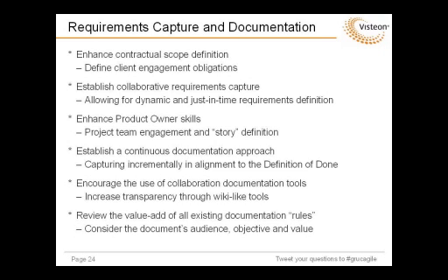Yeah, I mean, obviously, as I mentioned earlier, we're a very conservative, very traditional type of product development organisation. We like to go to our customer, negotiate a set of requirements for a component up front, and then we try and deliver that and manage change incrementally. Now, we struggle with that because the customer obviously doesn't know a lot of the time exactly what they want. There's a lot of change. There's a lot of unknowns at the front. We try to document that and have these great big documents where we think we've got everything written down, and actually there's false security in there. It's not really helping either of us.